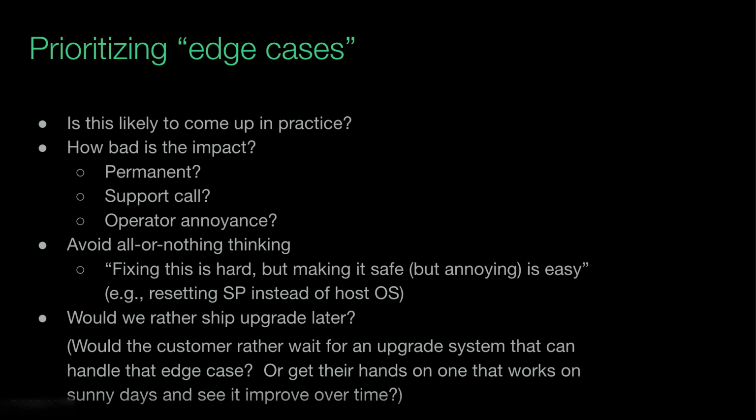Obviously, the question we're always asking is, would we rather ship upgrade later in order to deal with this? That can sometimes be a circular thing because you're like, well, that's the question I'm trying to answer. What I sometimes find helpful is I imagine literally that same customer, but also other customers, and ask them, would you rather wait for this update system a little bit longer in order to handle this case, and then be spending 30 seconds rattling off an extremely obscure case?